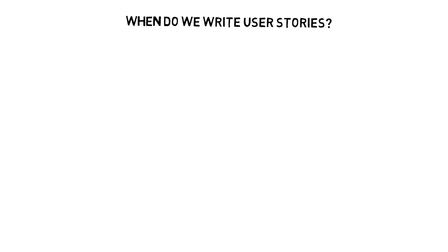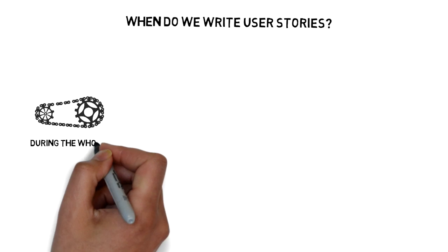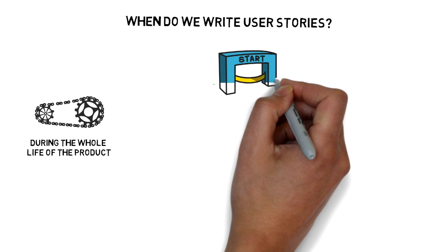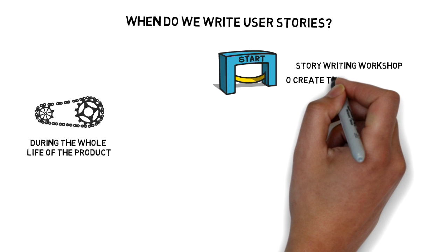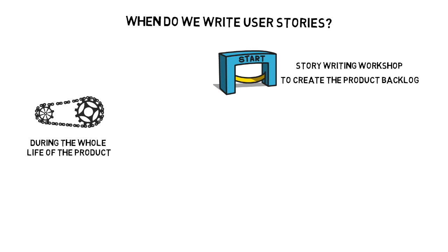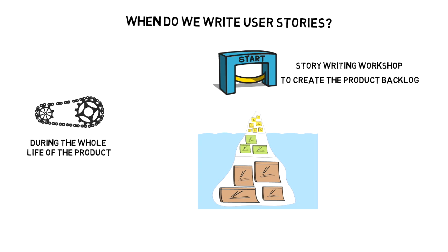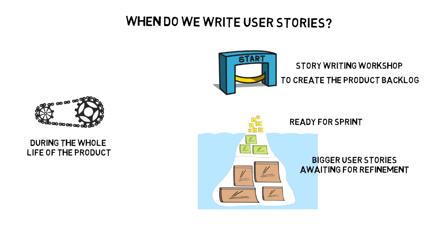Finally, when do we write the user stories? User stories are written during the whole life of the product. Usually, a story writing workshop is held at the start, where team members participate with the goal of creating a product backlog that describes the functionality to be added over the course of product development. Some of these user stories will be big ones that will later be split into smaller ones that can fit into a single iteration. New user stories can also be written and added to the product backlog at any time and by anyone.